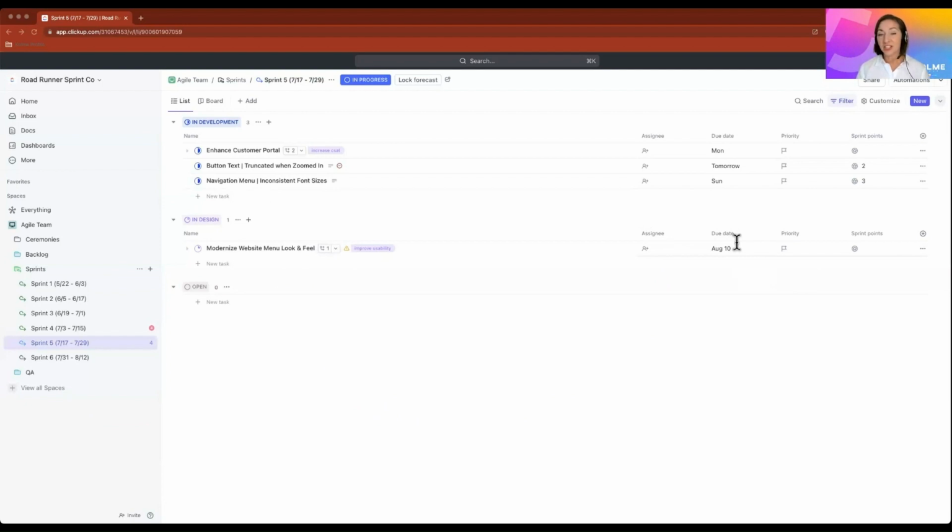In the Scrum methodology, inspection is encouraged to be increased by daily inspection of the work that's progressing in the daily Scrum. Inspection happens in sprint reviews, retrospectives, backlog refinement, checking to see if the definition of done has been met, and definitely through transparency in information radiators, which is showing the progress and making sure that performance of the team and the progress of all the work that's being completed is visible to everyone.